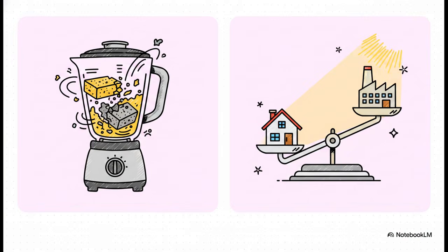So, a big loophole is splitting or combining contracts artificially. A company might try to mix a really bad, loss-making project with a highly profitable one just to hide the losses, basically shifting profits around artificially. The AS7 fix shuts this down entirely by insisting that any segmentation or combination of contracts must be based strictly on the commercial reality and the true substance of the agreement. You can't just mix and match to hide the truth.